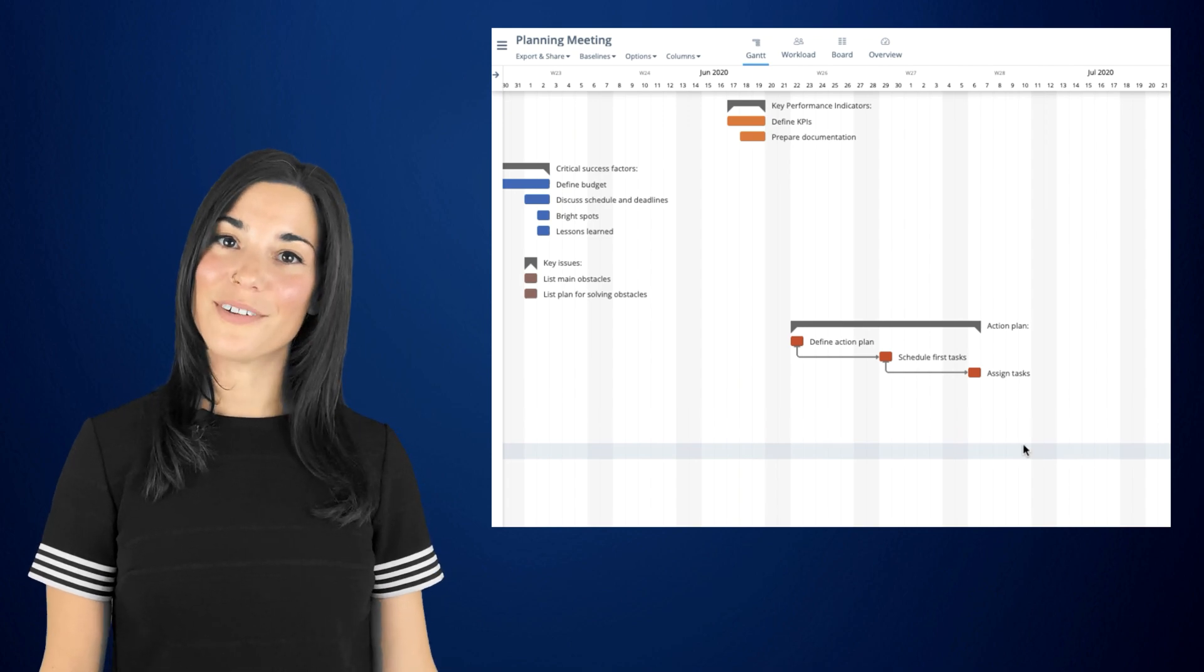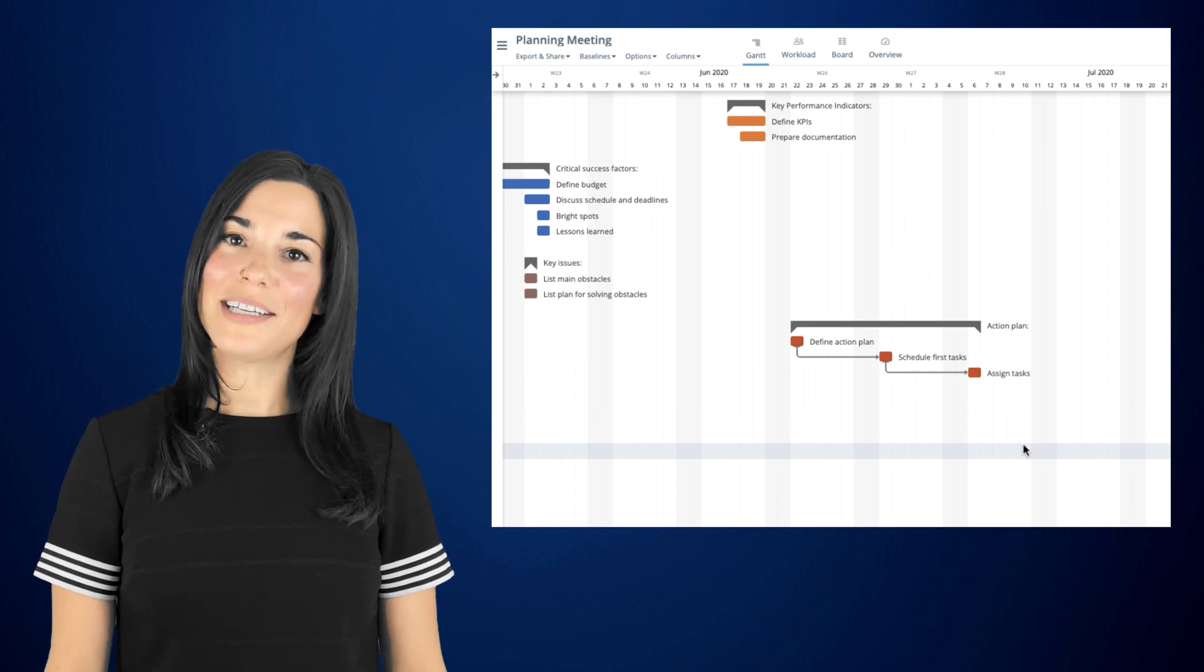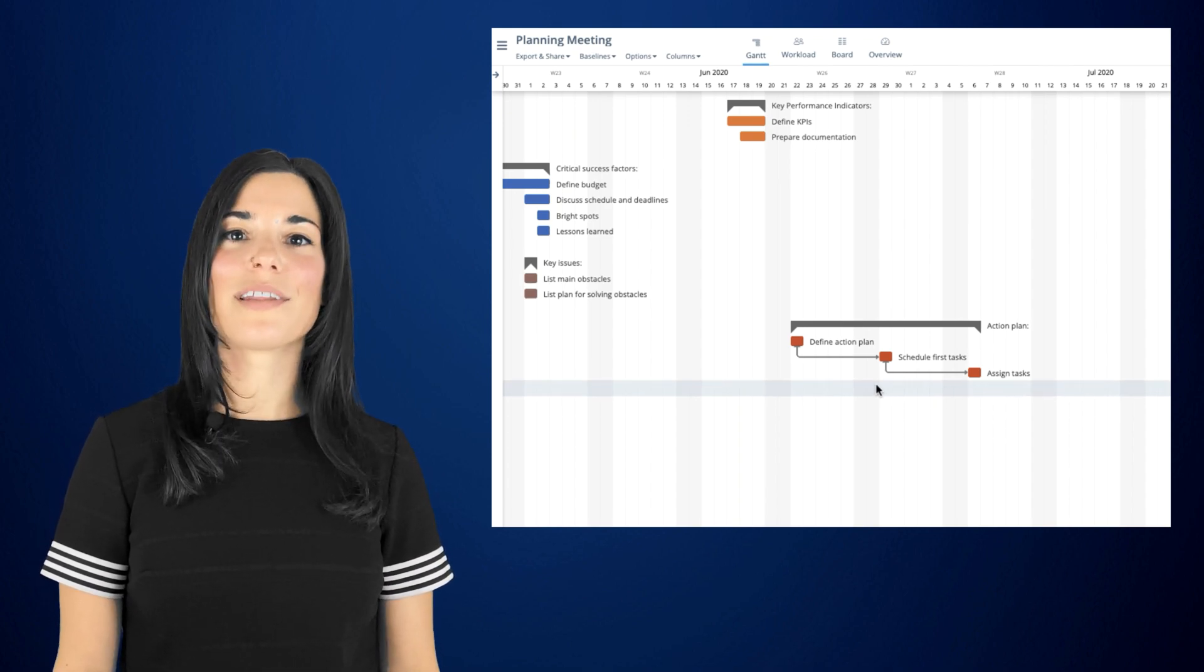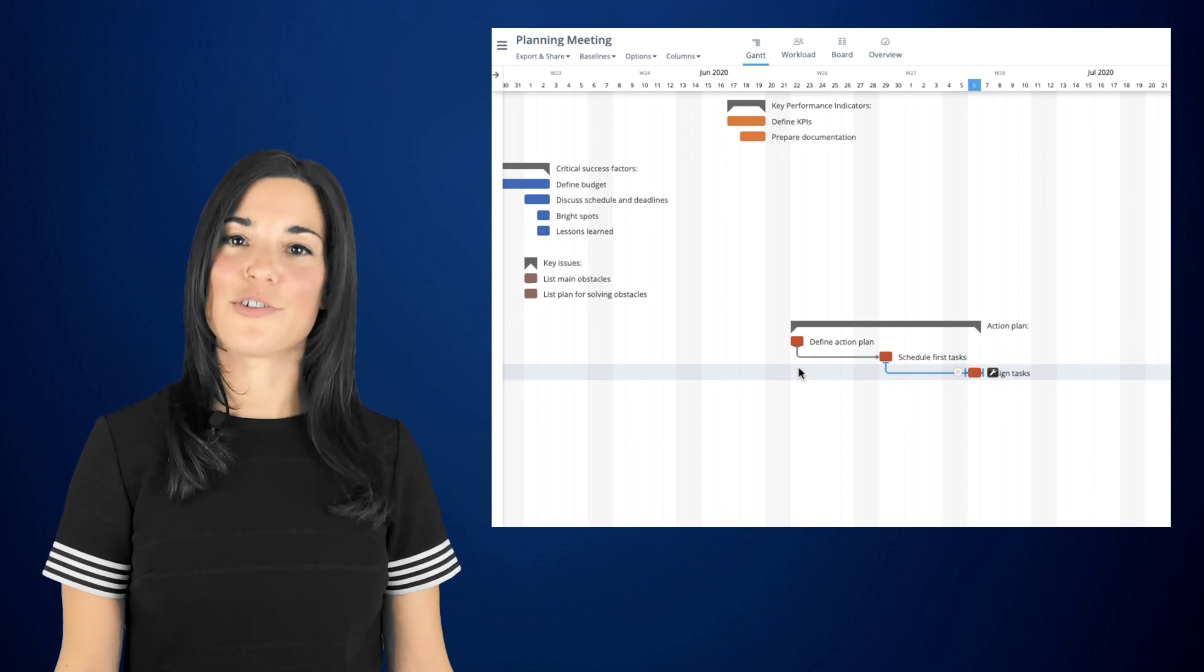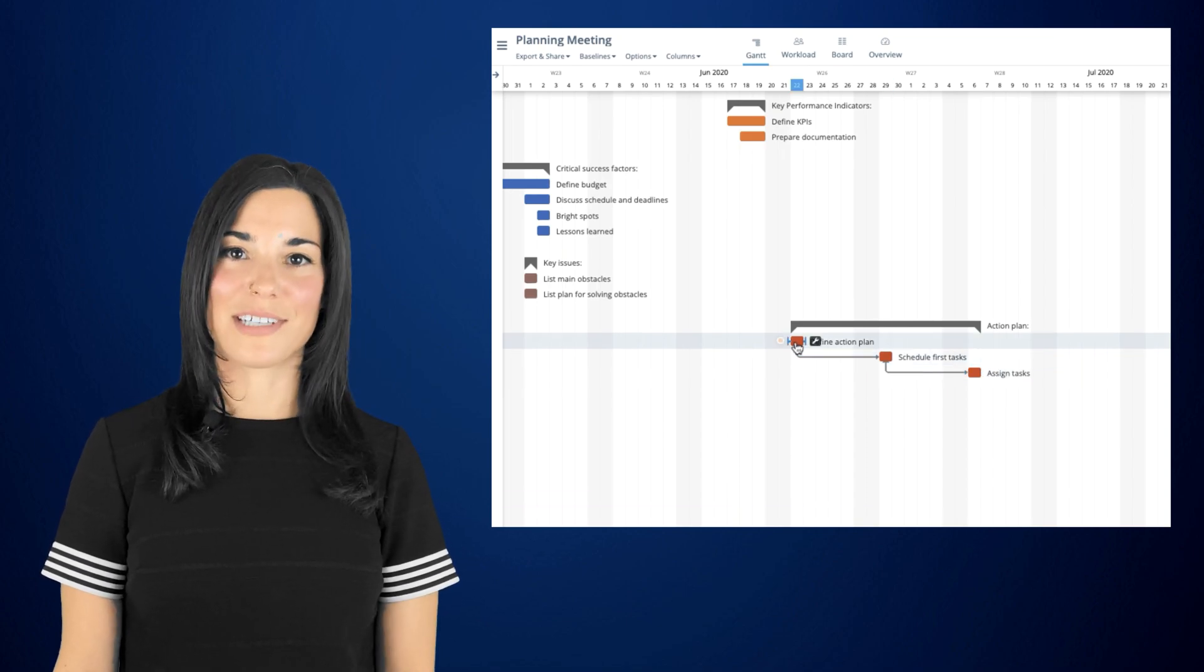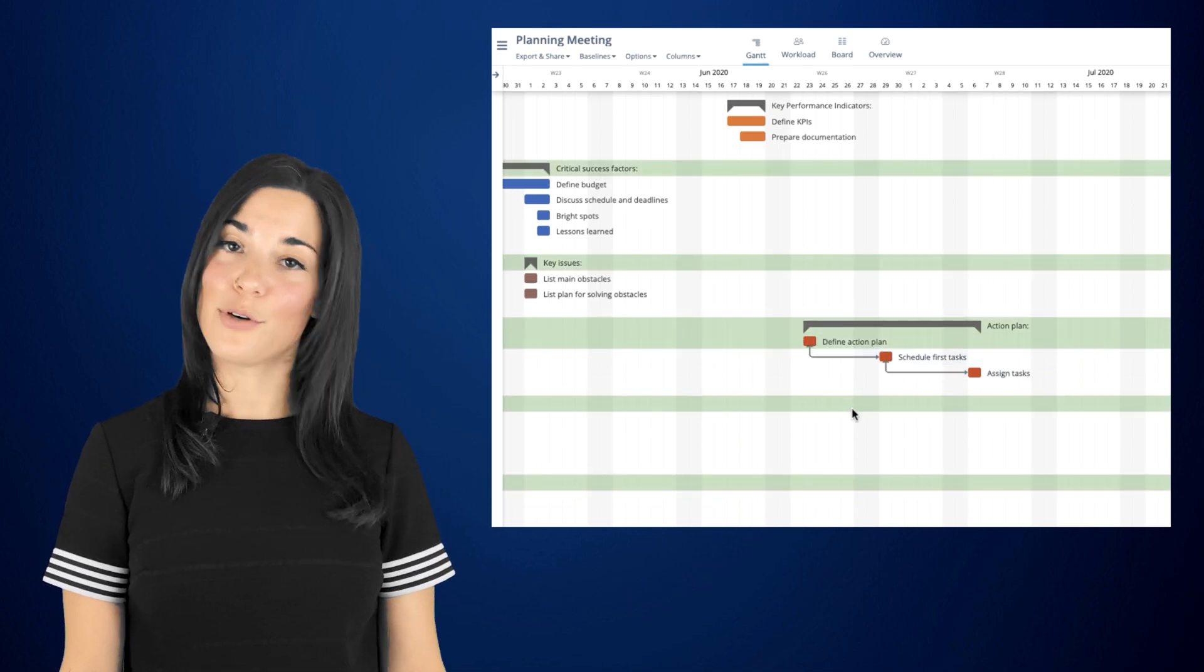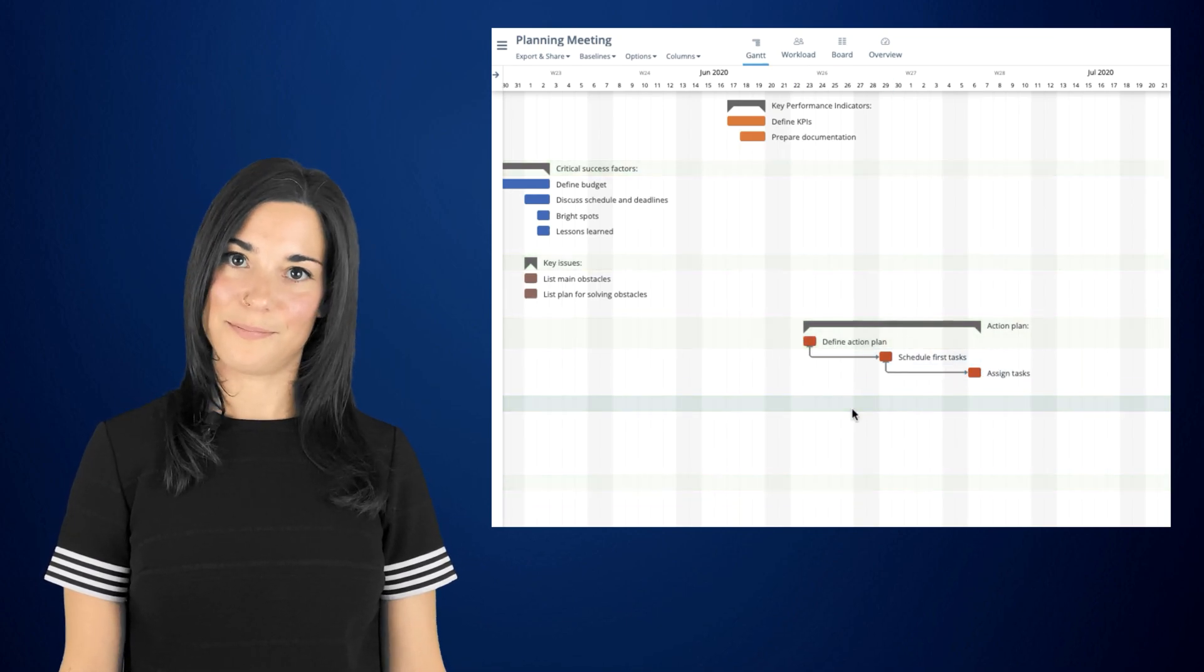By default, when you automate dependencies, there can be a gap between the dependent tasks. And by dragging the predecessor task, your successor task will not be moving along with it.